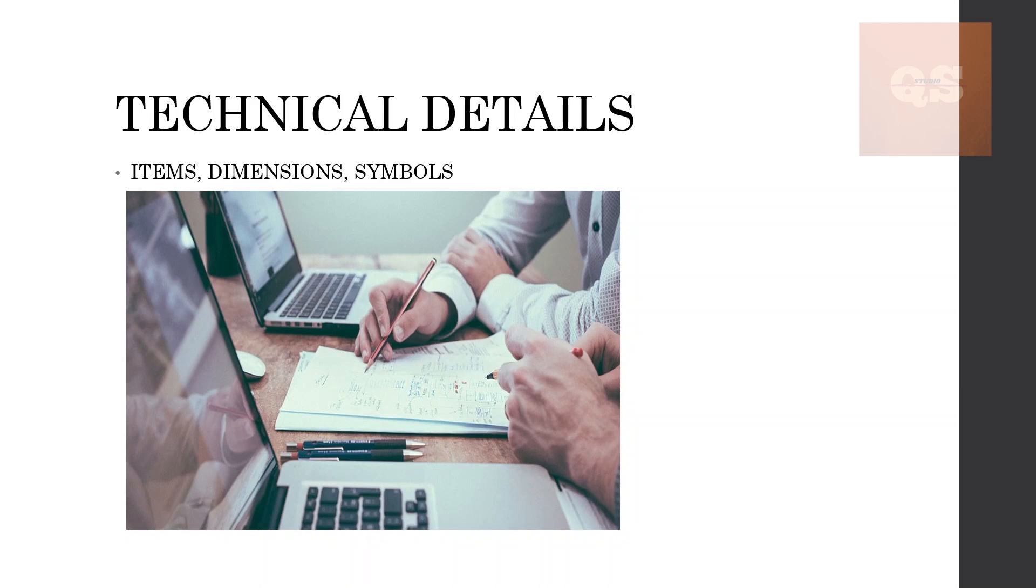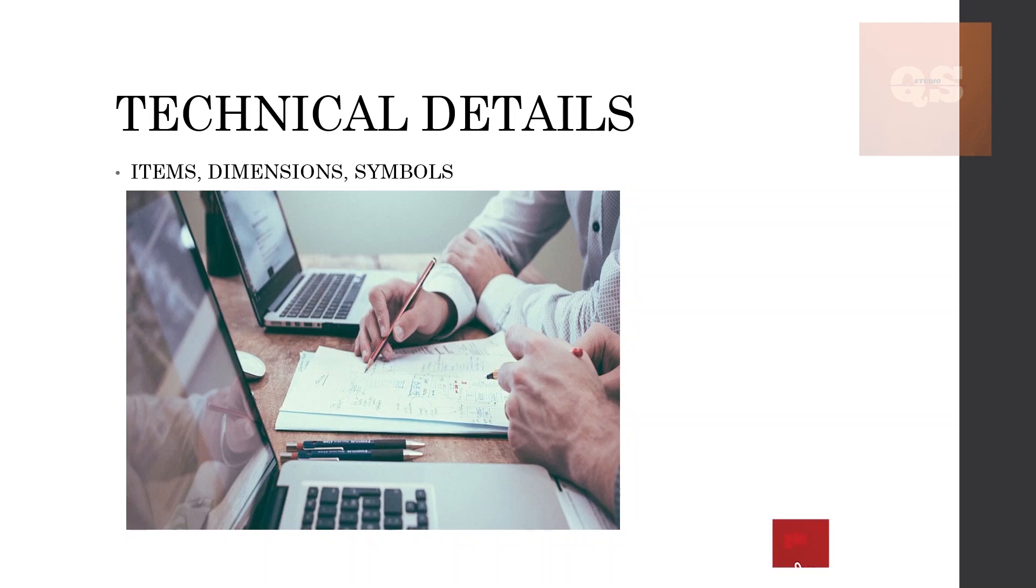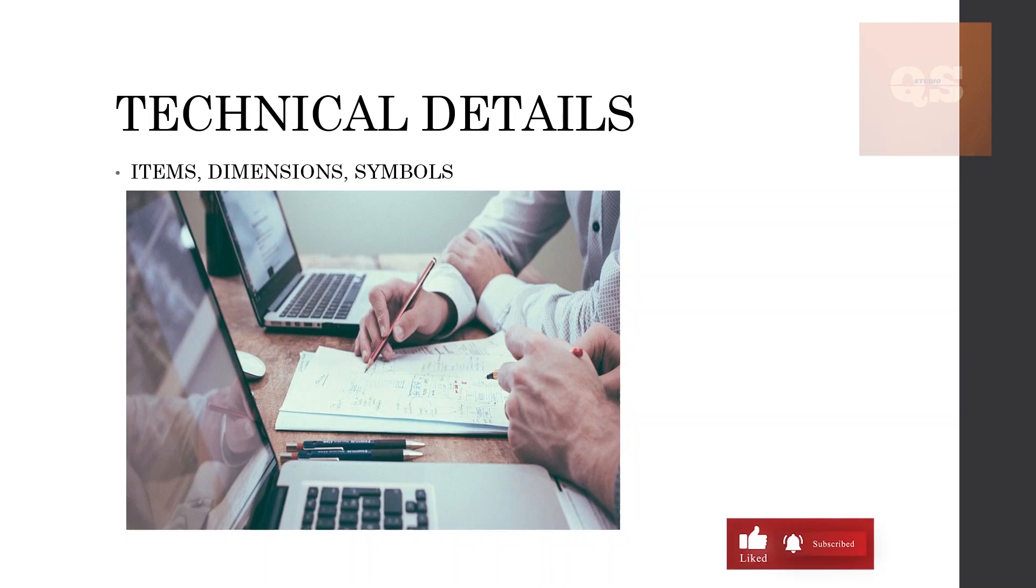Basically we need to look if any item is missing in the drawings—some items that need to be there in the drawing but are missing. Sometimes a pipe routing, there might be ducts missing in some room, there might be pipes missing in some rooms, there might be doors not shown in some areas of the floor. Or again there might be dimensions—the ducting dimensions or the pipe dimensions missing in the drawings.